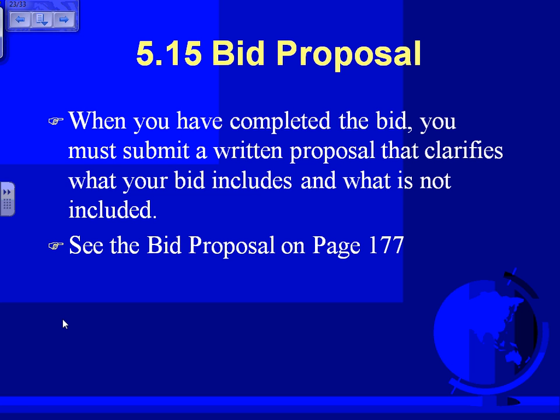Otherwise, guess what? If the job is going to stay for 2 years, you're not going to be paid for 2 years. What do they call this person? You're going to have a lack of fluid, currency, cash, thank you, that's the word I'm looking for. Cash flow problem. You're going to have a cash flow problem, because you have to borrow the money to pay the electricians. You're not going to say to the electrician, oh, by the way, you're not going to be paid until we get the money out of the owner. So you have to pay a lot of attention to the cash flow problem.